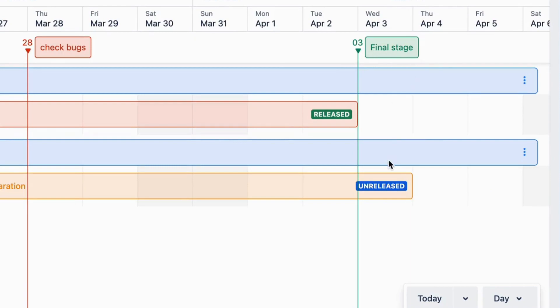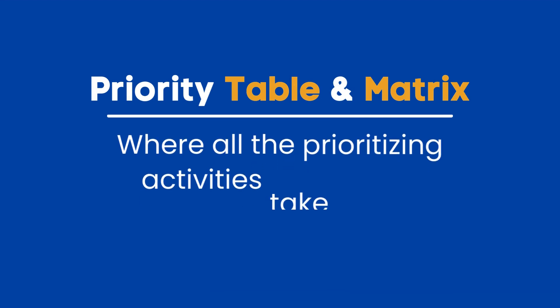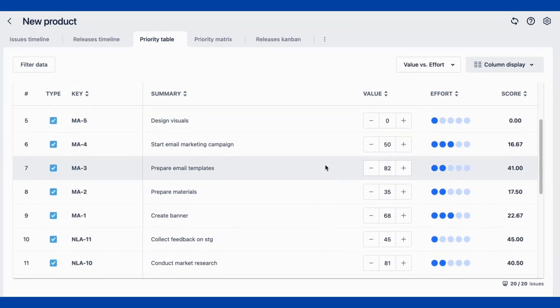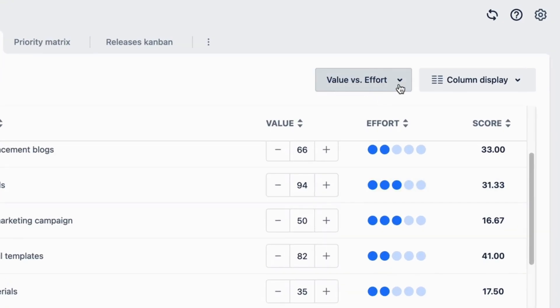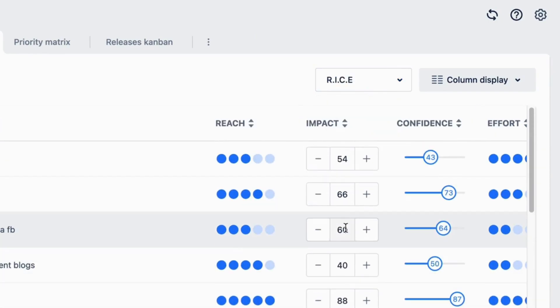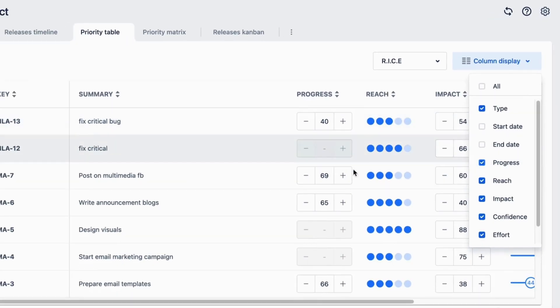Now we move on to the priority table and Matrix, where all of the prioritizing activities take place. The whole team can get together and evaluate tasks in progress as listed in the table. You can use either the value versus effort or the RICE prioritization method to make an assessment, or you can customize a method to suit your needs.